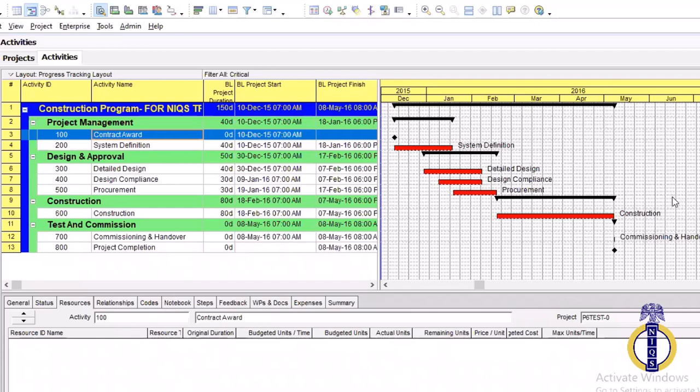In our case, for each day, I think it's about 150 million US dollars. So on turnarounds, 150 million US dollars. They can pay you anything to even save 1 day. The contractor can bring in excess resources, because there is no way you spend up to 150 million US dollars for 1 day.